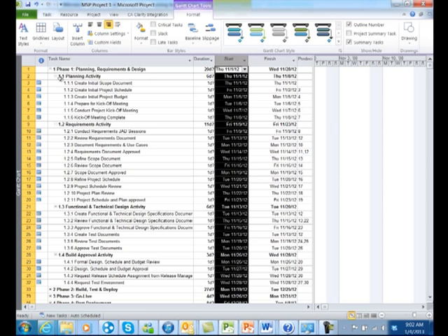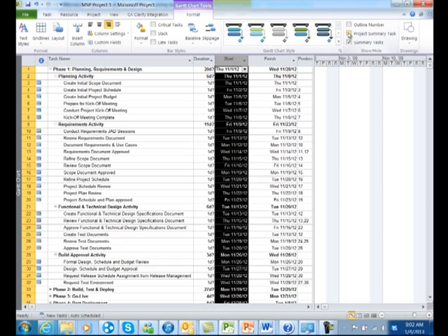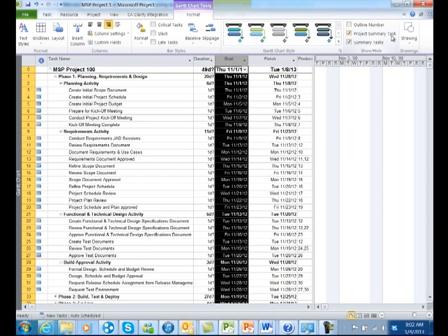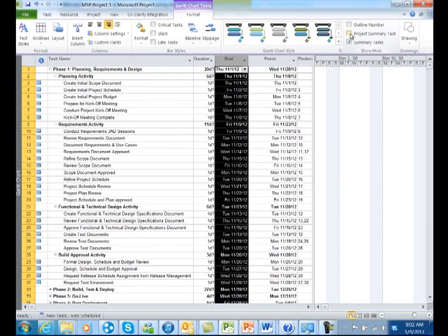If you see here, the outline number appears for the work breakdown structure number associated with the tasks. You can switch on a project summary task, which summarizes the name of the project. Or you can switch on and switch off the summary tasks. As you can see, these recommended settings again are in the training book.